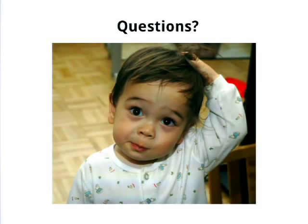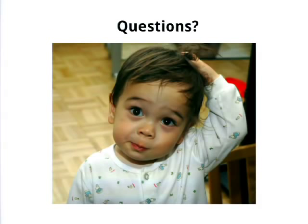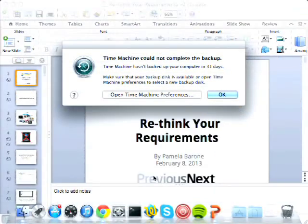It really is just depending on the client — whatever makes them most comfortable. Once you have the budget, it's roughly 20% inception, 10% delivery, and 70% construction. If you found that the inception phase only took 15% of the budget, that's five more percent you can use for construction. And they really like to hear that — 'Oh cool, more money for construction.'